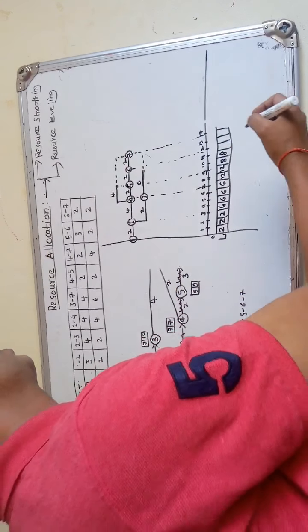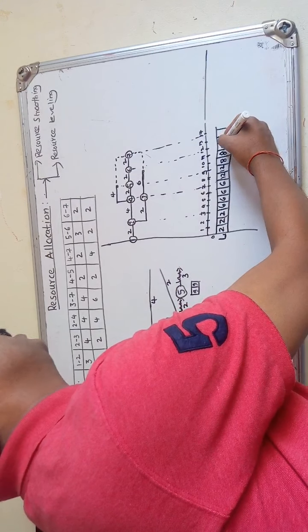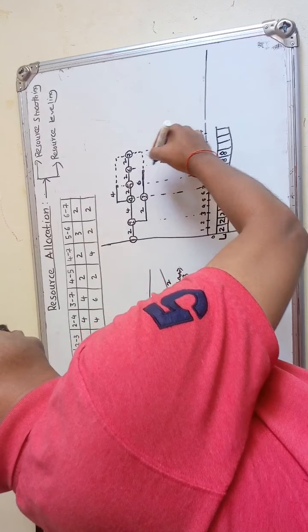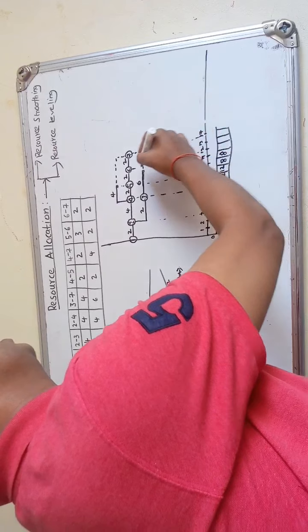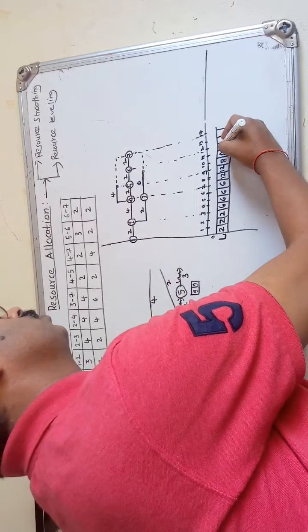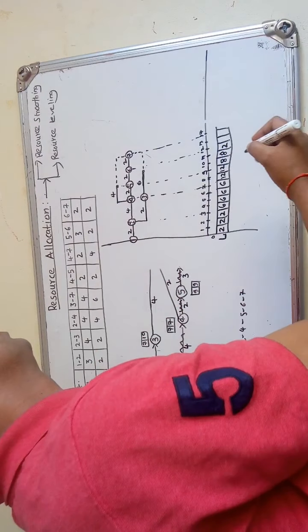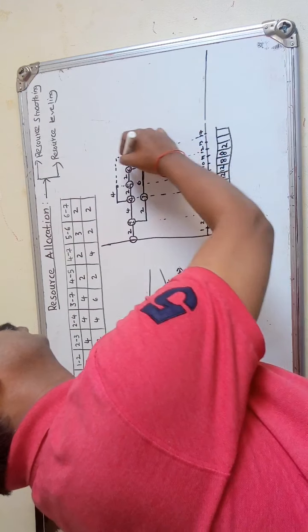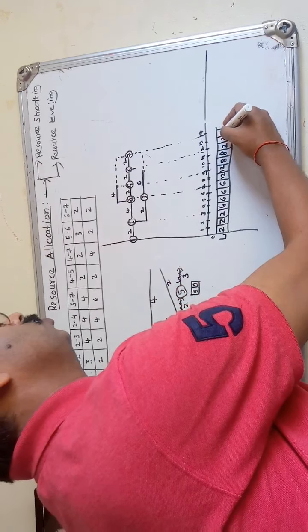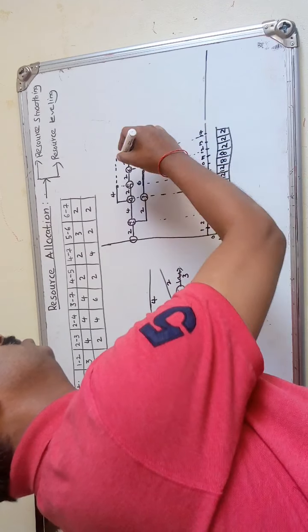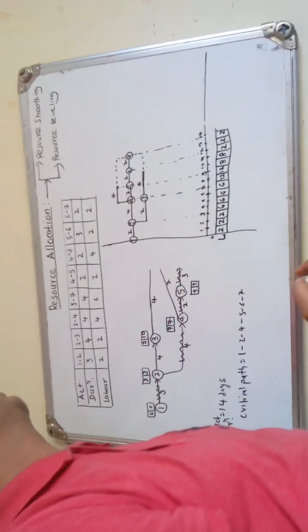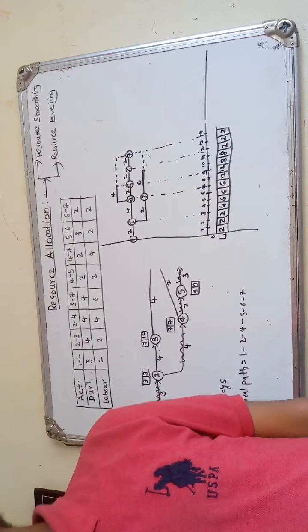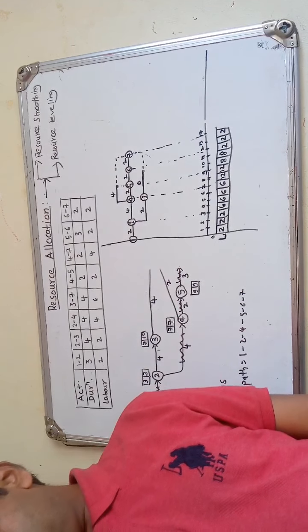Then for the 12th day, if you see, on the 12th day only the requirement is 2. And for the rest, the 13th and 14th, only the requirement is 2. Simply you have to move in the upward direction, and where it cuts, that requirement is to be taken. So this is the manpower required that we have found out by this particular time scale version diagram.